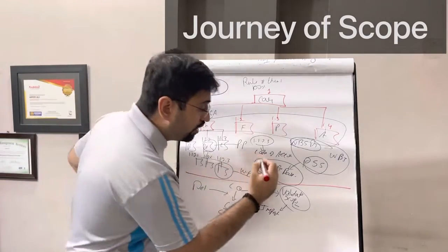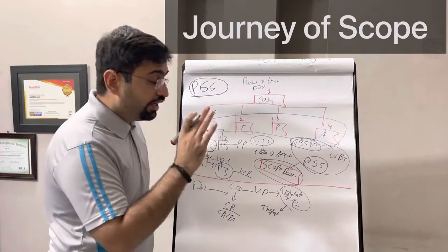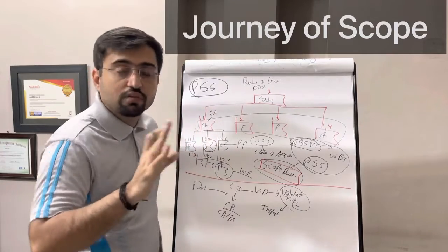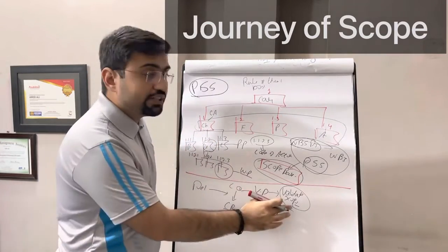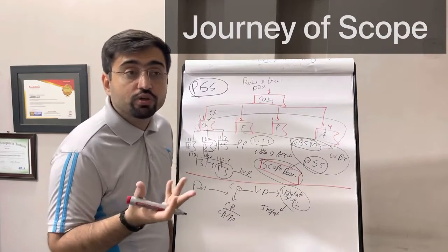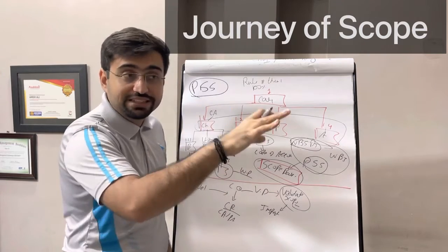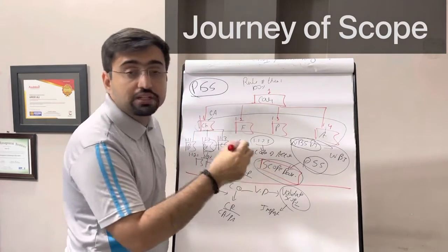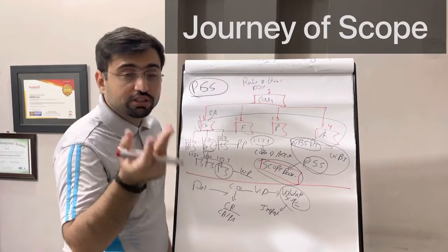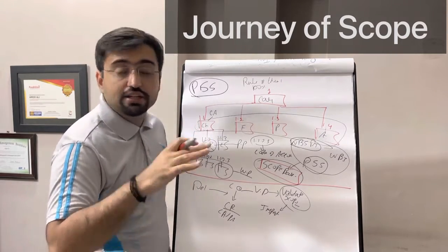This is the most important thing if you are working in a project. What is your scope baseline? If something is not in the scope baseline, we are not going to produce it. So if the customer says, let's say, we ask for this feature and it is not present, what to do? Look into the scope baseline, look into the project scope statement, was that there? If not, this scope baseline is also approved by the sponsor, customer, all those people. If it is not there, it is right, it should not be there.